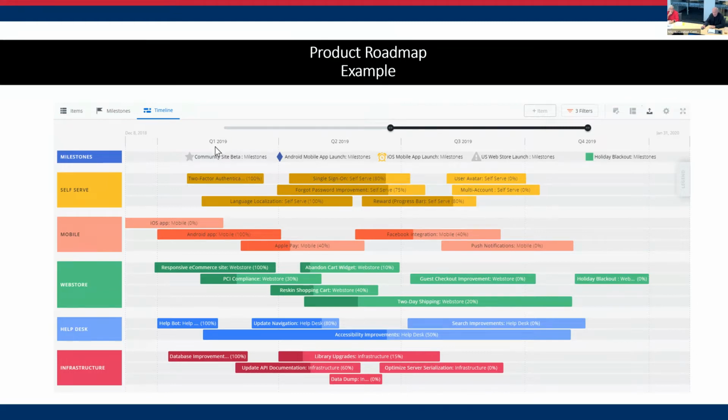And you can see here at the top, this is the importance of the time bound. When you lay out a product map, you want to determine what you need to do, which is all of this stuff in these multicolored elements, but you want to set yourself a time frame to get them done, because then costs can be applied to that, resources can be applied to that, and you can be very effective in talking to individuals, giving directions to employees or vendors, and then ultimately telling an investor why you may need money in order to be able to prove that.